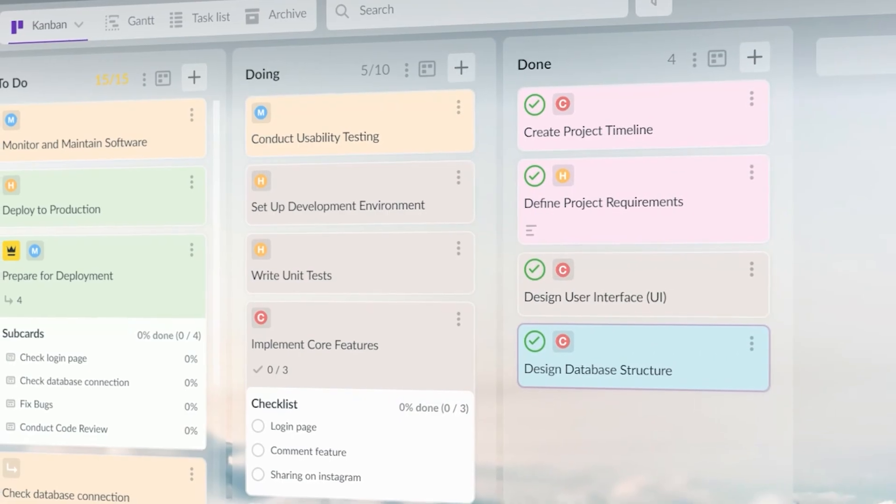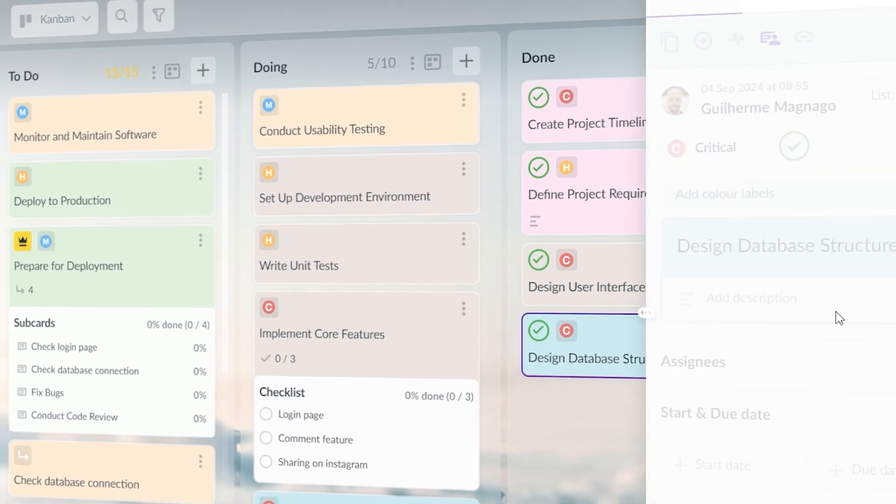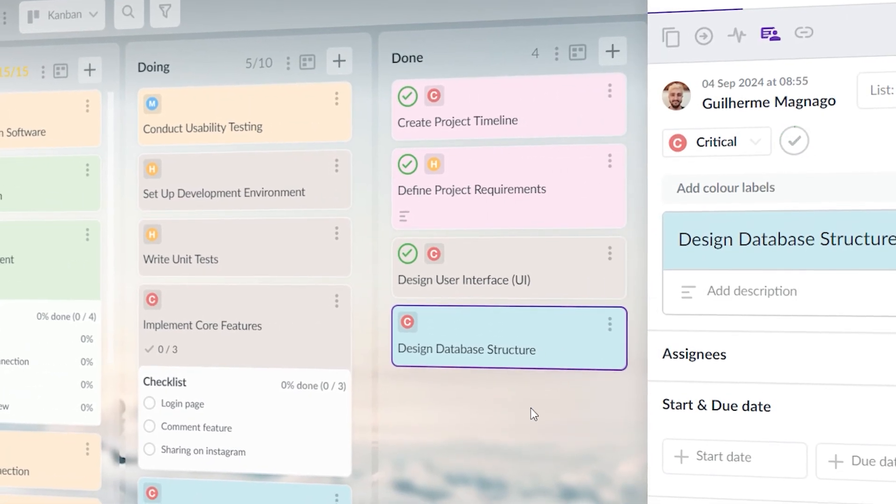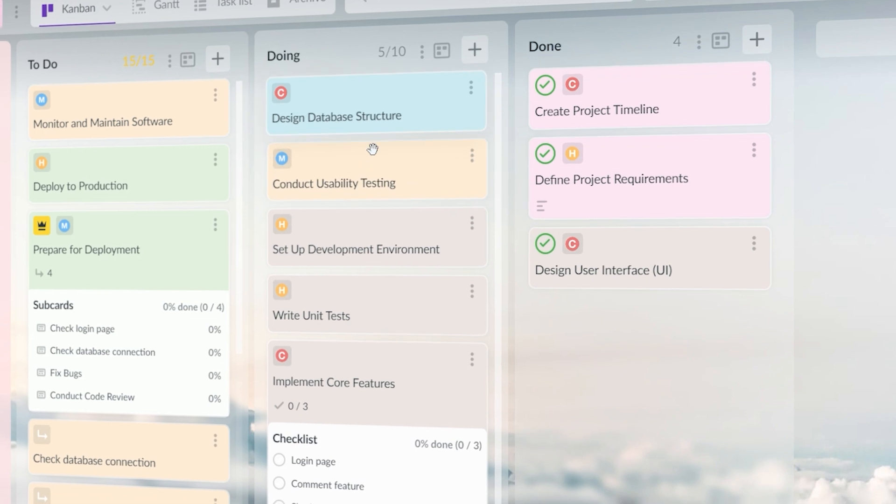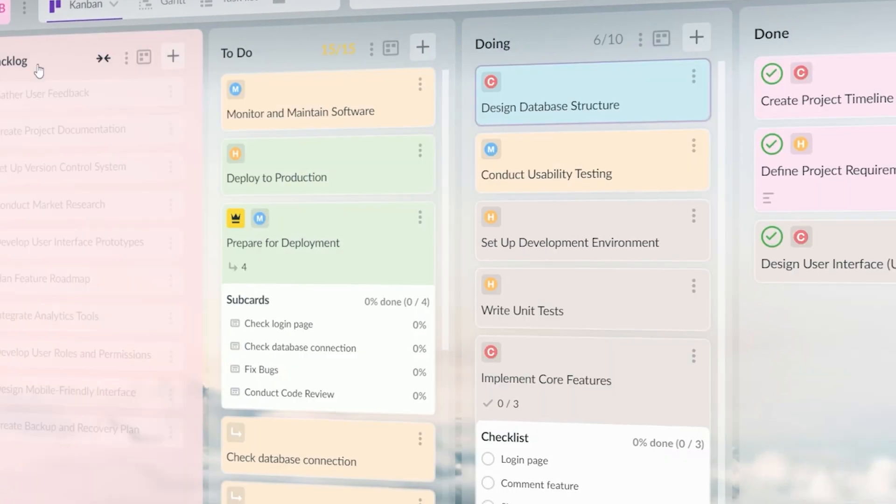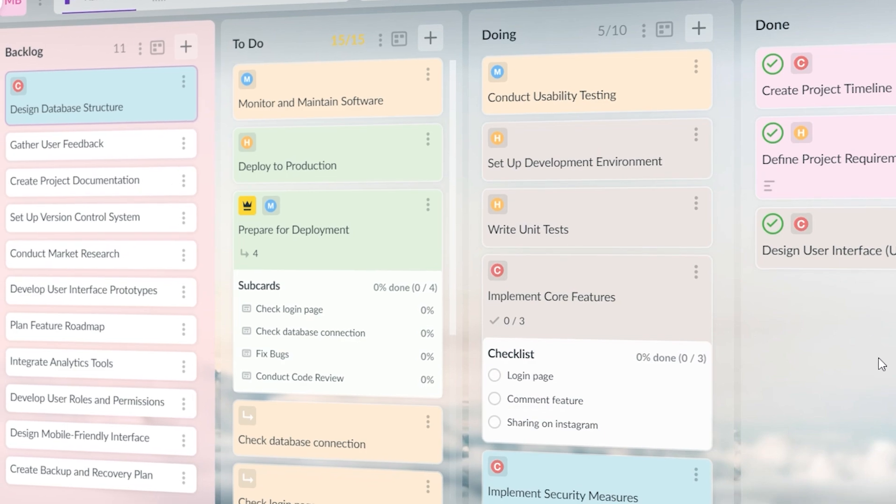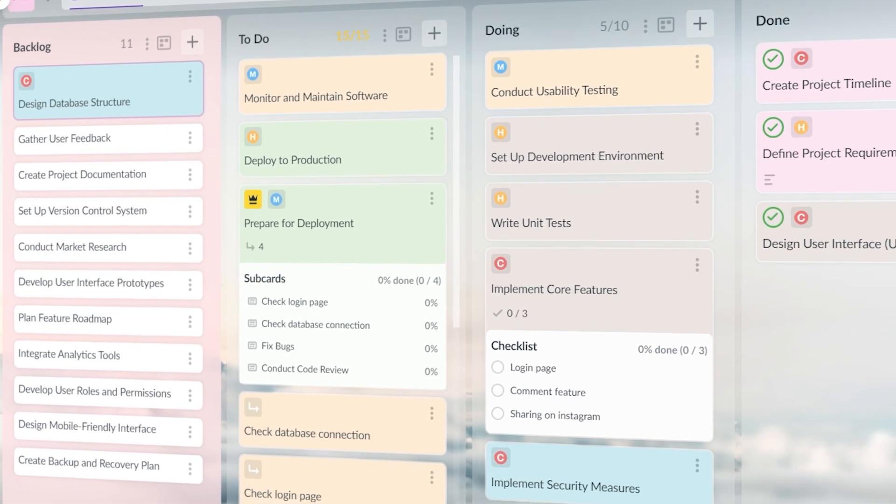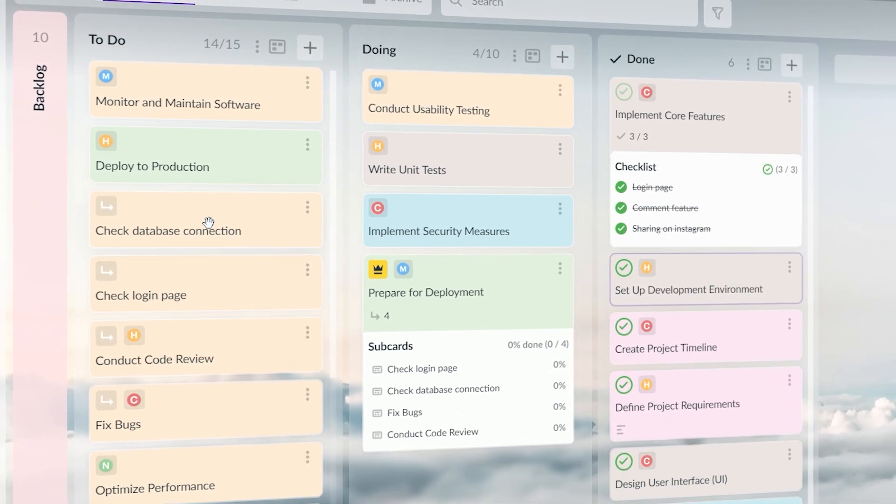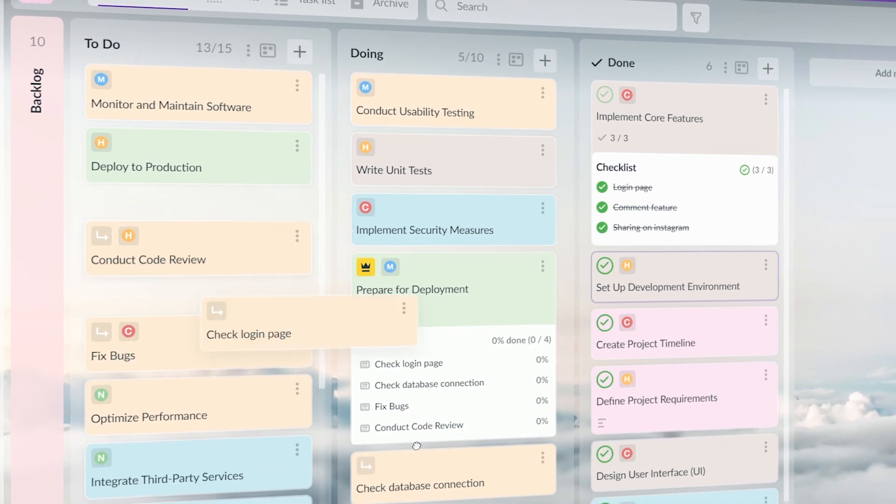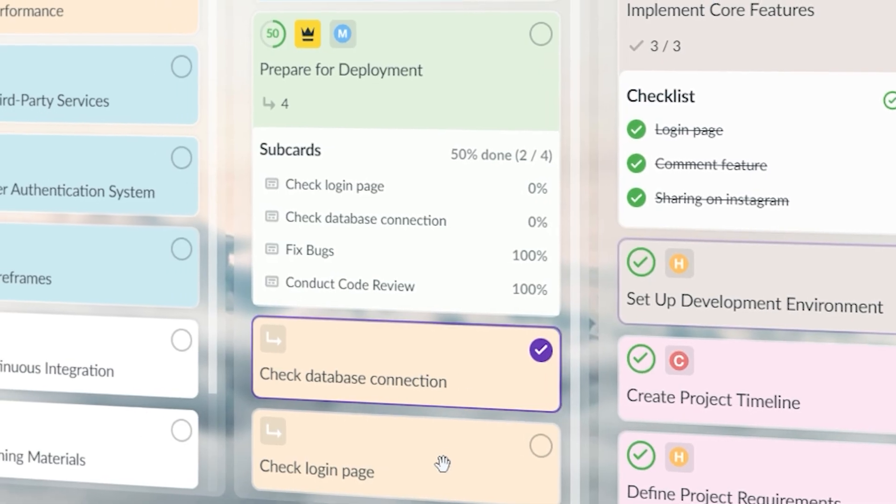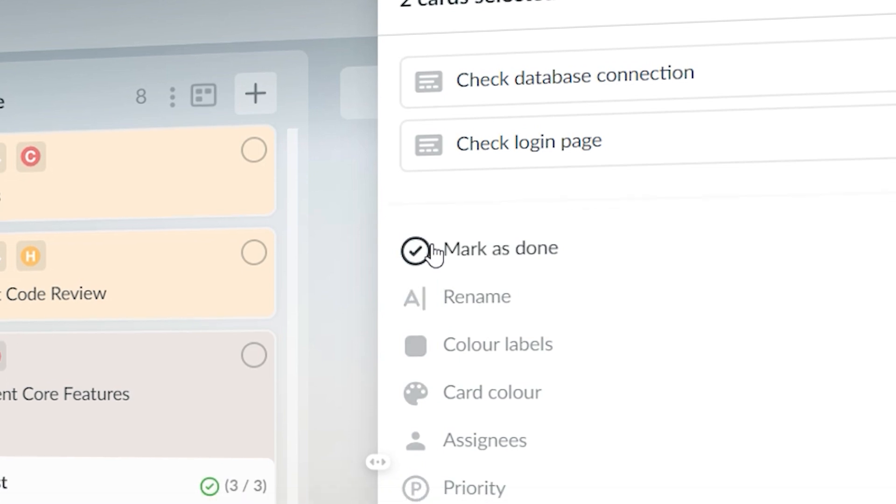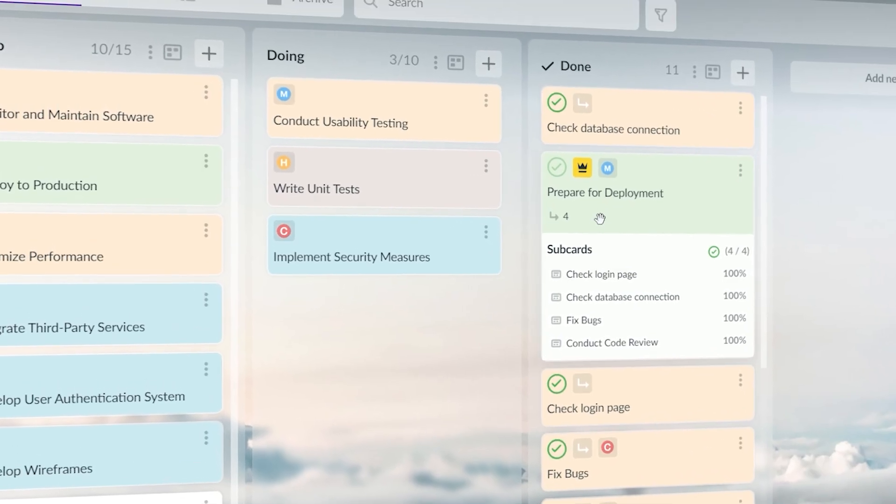Linear movement is central to Kanban, and once a task starts moving forward, it should never go back. But in the beginning, I would regularly move tasks back to columns to the left after they had already advanced in the process. For example, when I hit a roadblock, I would move the tasks back to backlog. It may not seem all that relevant, but it sends a message that it is okay to start tasks and not see them through. Having work-in-progress limitations as a central aspect, Kanban demands commitment when a task is started.